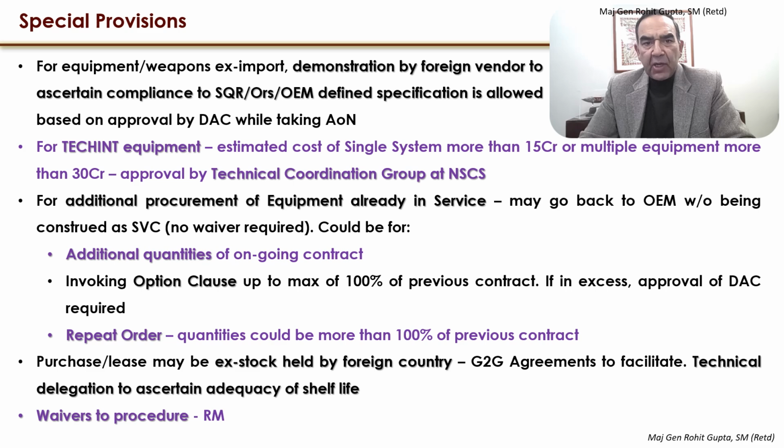Now, for equipment or weapons ex import, as I brought out, demonstration by the foreign vendor to ascertain compliance to the SQR, the operation requirements or the OEM defined specification is allowed, and the empowered committee or the MTDT would basically witness these demonstrations. However, these have to be approved by the Defense Acquisition Council while taking the AON.